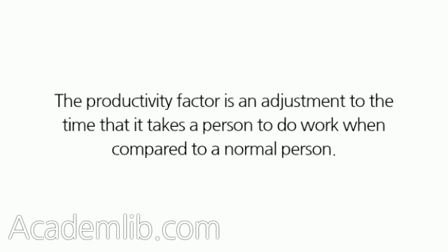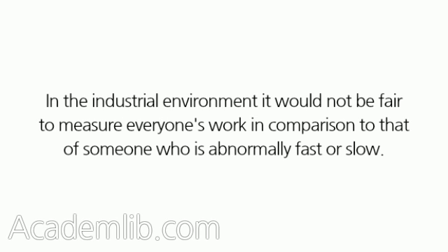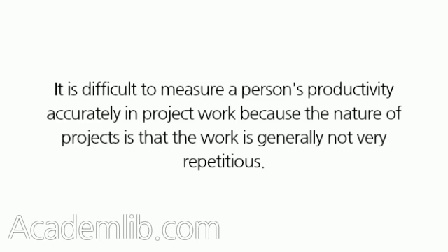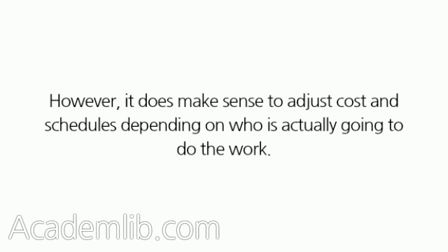The productivity factor is an adjustment to the time that it takes a person to do work when compared to a normal person. In the industrial environment, it would not be fair to measure everyone's work in comparison to that of someone who is abnormally fast or slow. Although the idea of productivity has its roots in factory operations, it is significant to project management as well. It is difficult to measure a person's productivity accurately in project work because the nature of projects is that the work is generally not very repetitious. However, it does make sense to adjust cost and schedules depending on who is actually going to do the work.